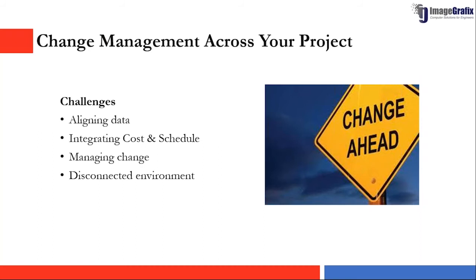To effectively manage changes across projects, we need to weigh the project change against the entire project and the impact it has on your project, as well as track the change origins. Where is this change coming from? Why is this change coming? If it is a budget change, why is this budget change coming? Did we make any mistake during the estimation part? We need to identify the reason we are getting this change.